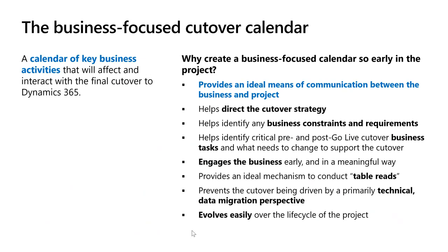Very often the cutover itself, or at least the data migration paths, can get very technical. There's a complex environment management you need to do, there are complex technical steps you need to do, and it's quite disconnected sometimes from how the business operates or what the business understands. So having that business-focused calendar provides a means for you to communicate with the business in language they understand. It can help direct the cutover strategy because you're now starting to understand the constraints and the requirements within which that data, that final data migration, that final cutover needs to happen.